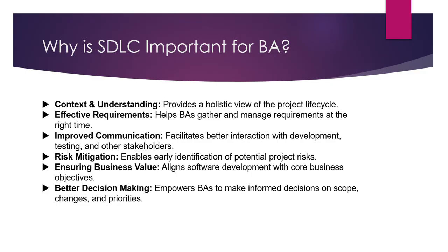Once that is completed, then we will move to the next stage. That is important, and it helps us. Once the requirements are frozen, so there is no change or enhancement in requirements, that will mitigate scope creep. Continuously adding new requirements increases the budget, the time and the technology. So that helps with risk mitigation.